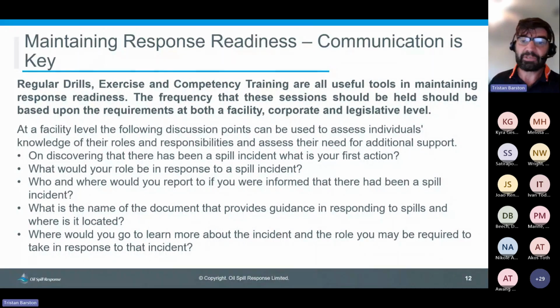I did a response in Trinidad a couple of years ago now, where initially we believed the equipment was going to come into the airport and then be mobilized from the airport to the location, to the port, and then moved out. But it just so happened that the main road from Port of Spain out to the port area was undergoing some quite major road repairs, which meant that we couldn't take that initial route with the equipment that we thought we were going to mobilize.